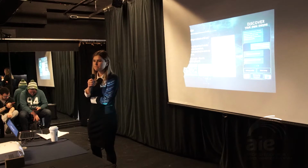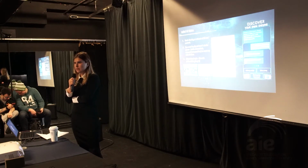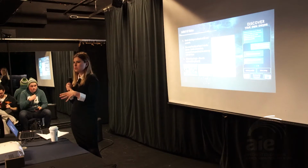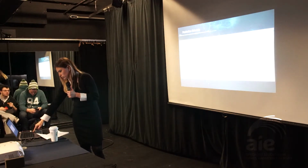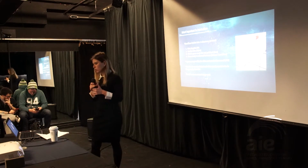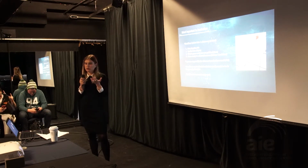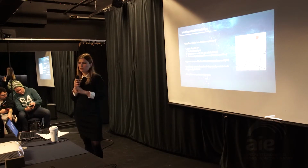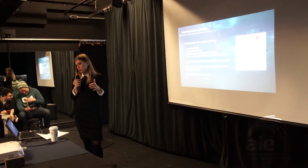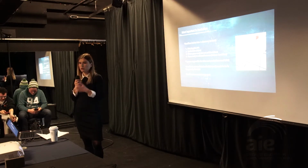How do you decide how much time you need to give everyone to learn the whole process? All that comes down to a deadline, and we need to know when we need to have a first playable. First playable is essentially the game build where you can do something and it looks kind of like a game and there's some environments. For a game we already know how to make, it's like 3 weeks. But for something new, it's a little art and science, and we would give a couple months for that. But the goal is to have something working.